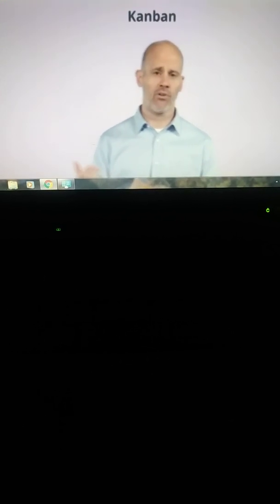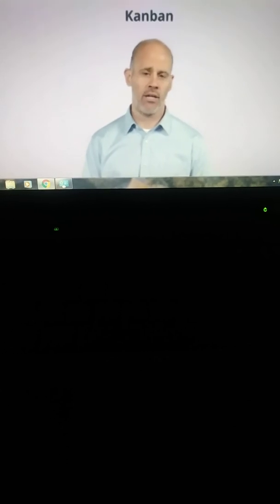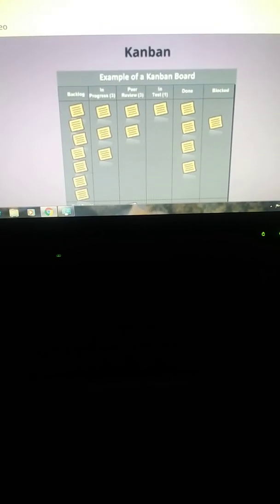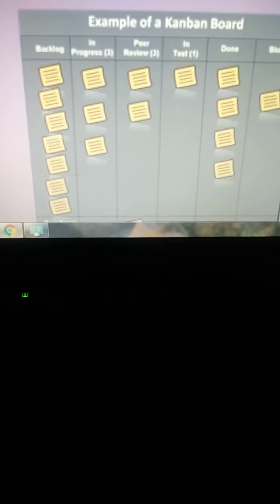Some of the key controls that you see in Kanban are WIP and cycle time. Now, WIP is also known as work in progress, and cycle time is generally how long something takes. So WIP is how much something goes through, and cycle time is how long something takes. Kanban is an approach to process change, allowing a better understanding of the workflow. Kanban advises limiting work in progress or WIP. Limiting WIP reduces waste from multitasking and context switching.